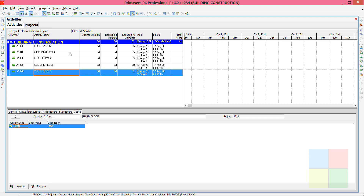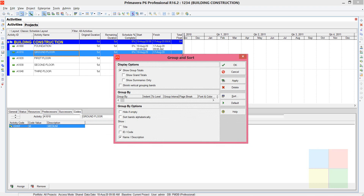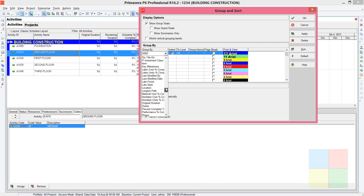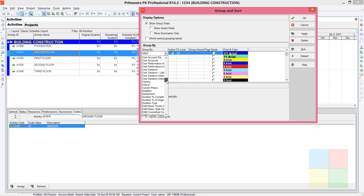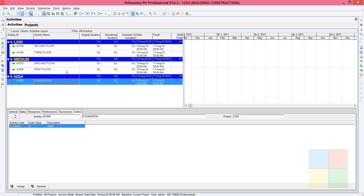Now let's view these activities grouped by cost. Right-click inside the activity box, go to Group and Sort, and maximize the dialog. By default it groups by WBS — click on it and search for 'Cost'. You'll see the one we created. There are many default activity codes in the software, but ours is here. Click on Cost, then Apply and OK.